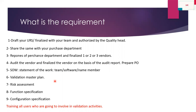The Statement of Work defines team responsibilities: who is the person responsible for the project, who is working, who is responsible from the vendor side. Next, prepare the Validation Master Plan — you know about the site master validation plan; prepare a validation master plan specifically for the software you are going to validate. After that, conduct a pre-risk assessment, because you are introducing new software or updating software, so you need to identify what could go wrong. Then obtain the Functional Specification and Configuration Specification from the vendor.